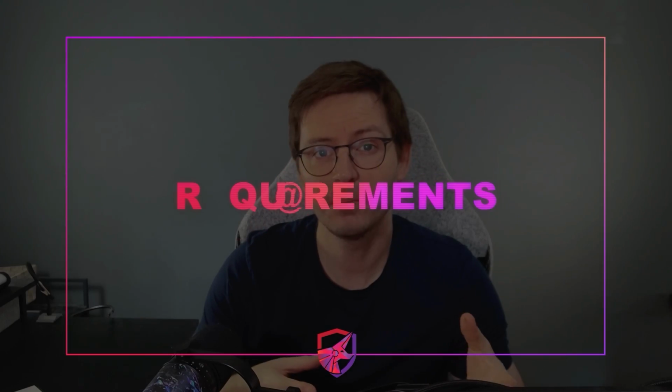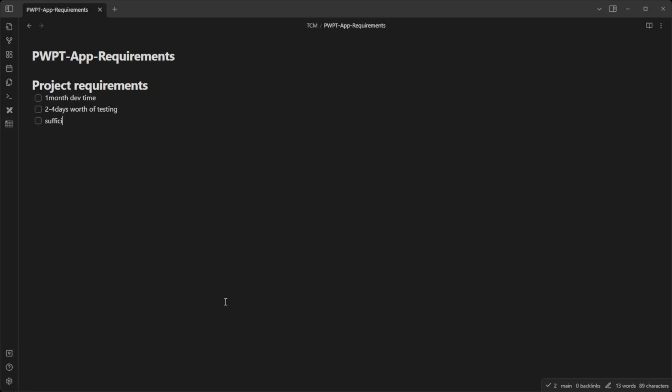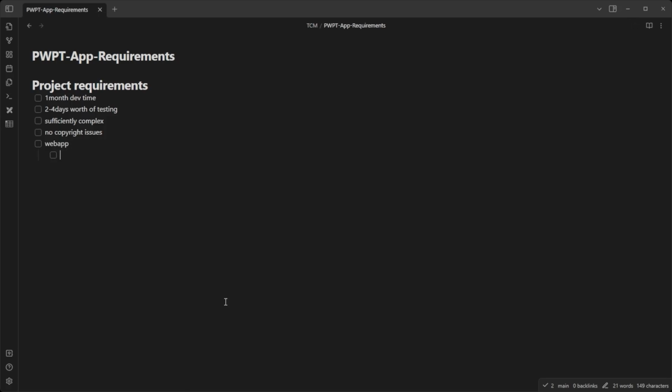All right, let's take a closer look at each of these steps in more detail, and I'll show you what the outcome will look like. So the first major step is the requirements, and some of these will be project oriented, like, hey, I've got a month to build this application, and some of them will be requirements like, hey, it needs to be able to support 100 users, for example, or it needs to be using a particular technology. So we put down everything that we know in terms of requirements and constraints and functionality that we know that our application has to have to begin with.